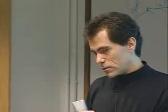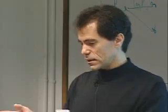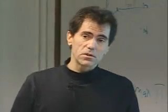And in integration, always, always, always takes longer than you think. You always plan assuming, well, nothing's going to go wrong, so this test takes this long, and this test takes this long, and this test takes this long, when in fact, as is always the case, you always have problems in testing. Anytime you're matching two boxes together, especially electronically, a lot of times you have problems. So testing is always something that you should make sure you have enough time to do troubleshooting and plan for failures and not plan a success-oriented schedule.